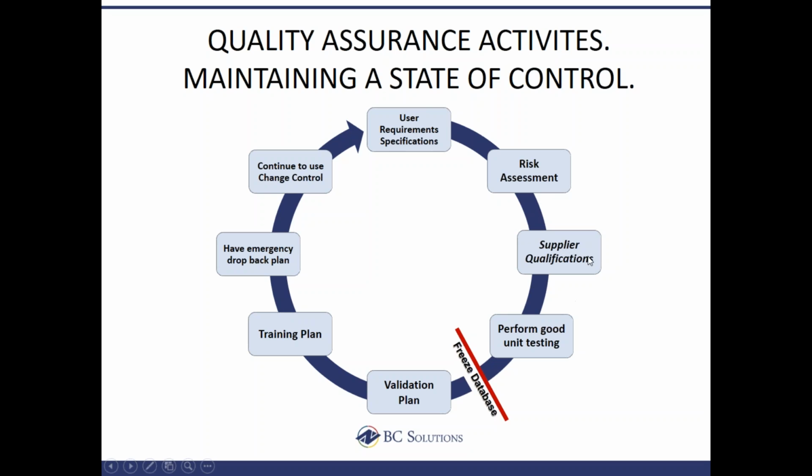And from that risk assessment, then you can qualify the vendor, and this is the validation activity we're talking about when you've purchased the system and it's time, or actually before you've even purchased the system in the case of a brand new system, to look at those requirements that you're trying to maintain in your system and have an idea of where the risk is in the system, so that you can adequately stress those things that are going to actually hurt someone.